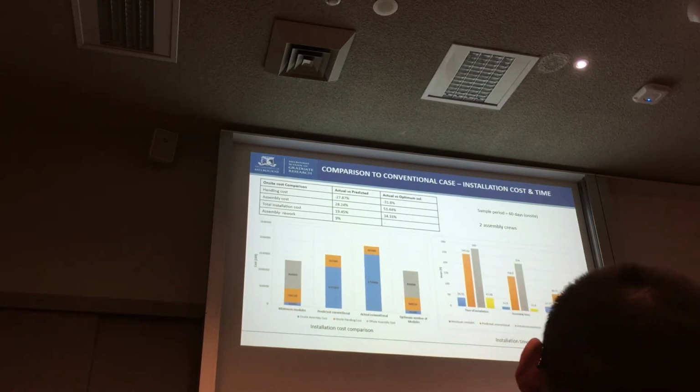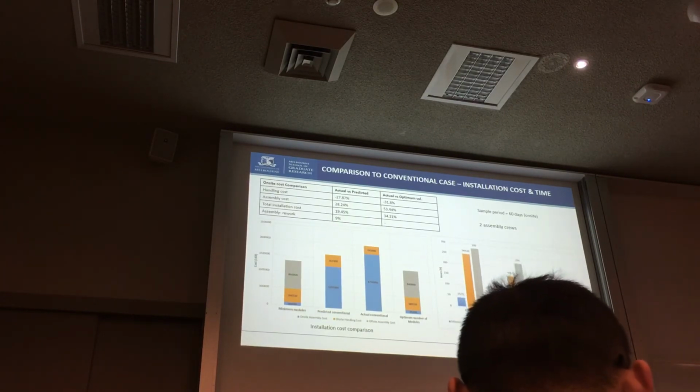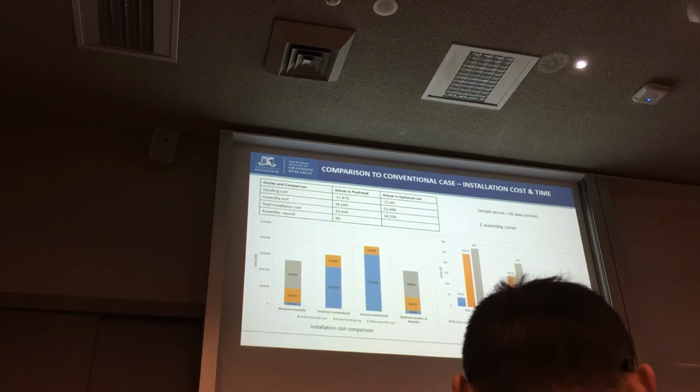predicted versus actual. This is mainly due to the rework cost in the actual construction process, whereas the algorithm is designed to estimate installation costs of a modular design. Modular construction is done off-site, so it assumes that no weld assemblies are done on-site. Complex assemblies are done off-site, so minimum or no rework is considered in the algorithm. Once you remove the rework from the actual installation cost, the variation between predicted and actual was only 9%, which is a fair estimation considering the inconsistencies occurring in the construction industry.